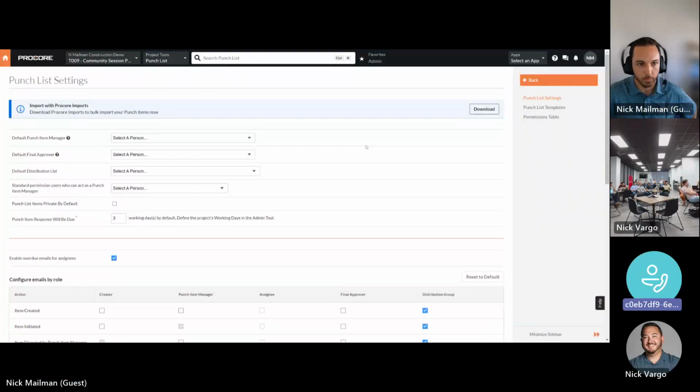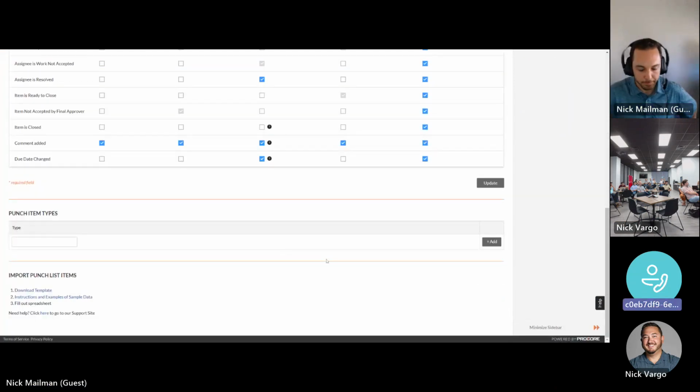I personally like them from the drawings. That's where we started. We also will usually create an extra set of drawings just for the punch list, so that all those pins help the sub find the stuff and they don't mix up with our posted set of drawings. We found that to be pretty successful. We use the QR code posted on doors, in door hinges, wherever, to make the location clear. The last job we did at a school, we walked the whole thing in a week with everybody who needed to come punch, and sent out one list at the end of the week.